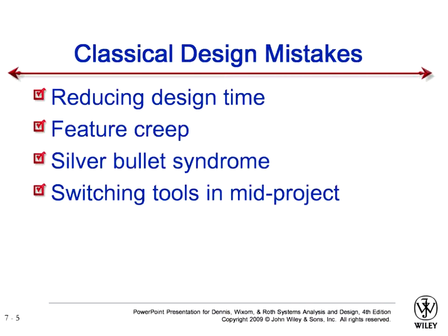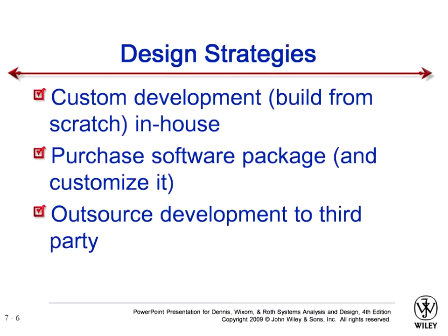Whenever you incorporate a new tool, everybody will have to move to that, and it will result in schedule slip, because your team will take time to learn and become familiar with the new tool, and sometimes it may not be suitable for you. Even if you find a tool which is very suitable for your type of design or requirements, if you are in the middle of your project, it is not recommended to switch a tool. So these are some of the classical design mistakes made by designers which are recommended to avoid.